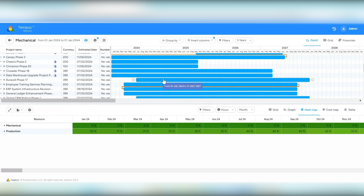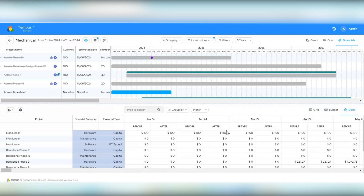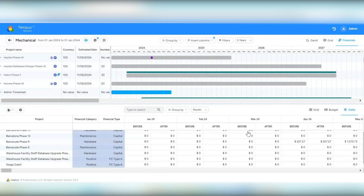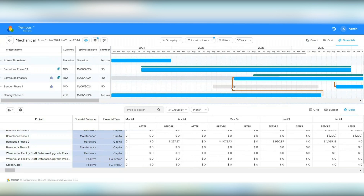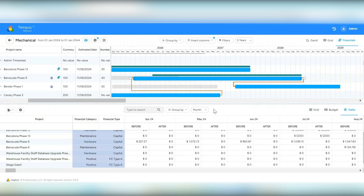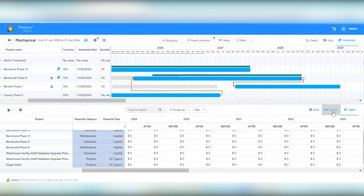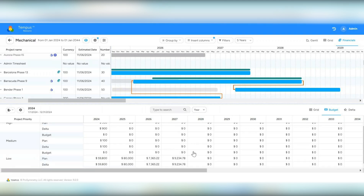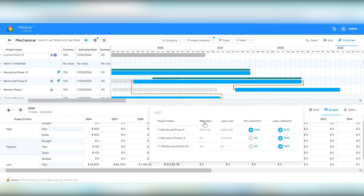We've added an option in financials to view the delta — similar to grid delta mode, this shows you before and after. You can go to delta mode, select before and after, and move Gantt bars to see updates reflected. There is also a year mode available to view before and after information. In budget, we added quarter or year mode. We also added an impact assessment grid — clicking on cells shows the project name, plan cost, labor cost, plan utilization, and labor utilization.